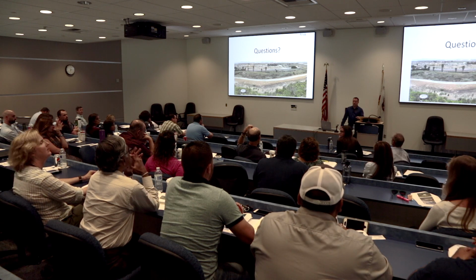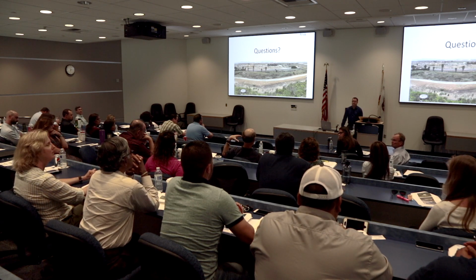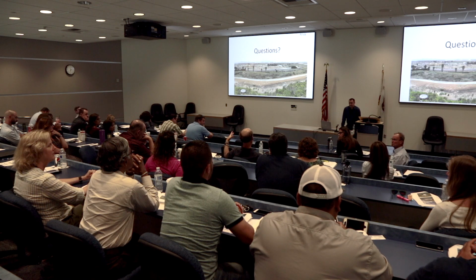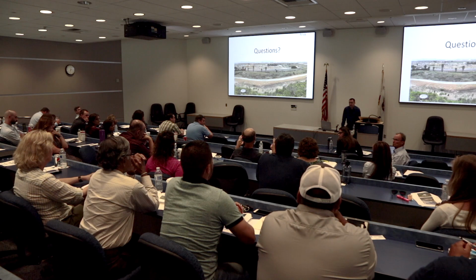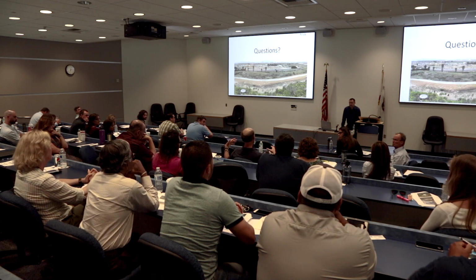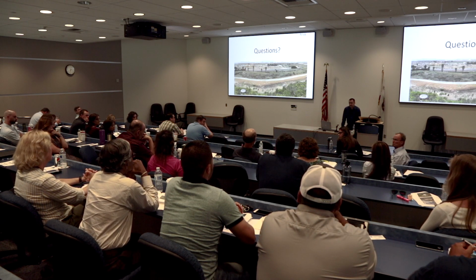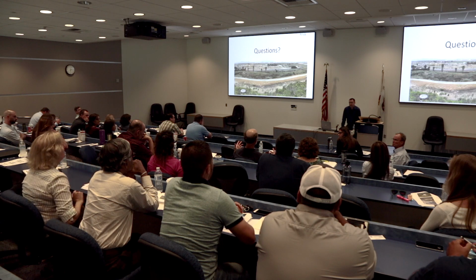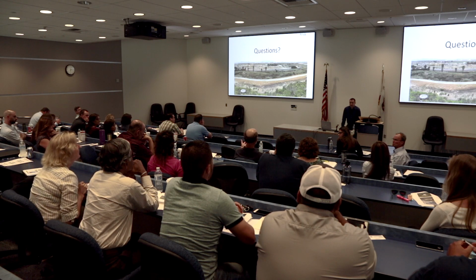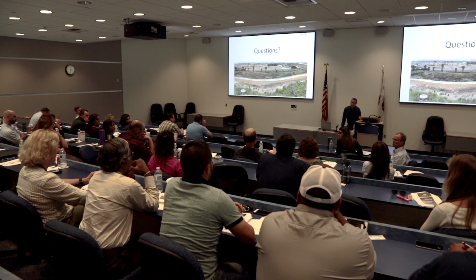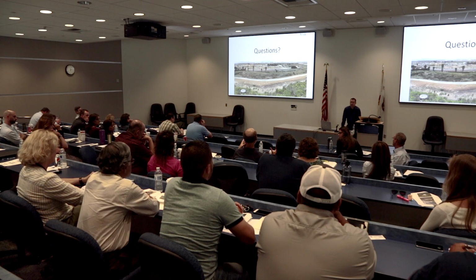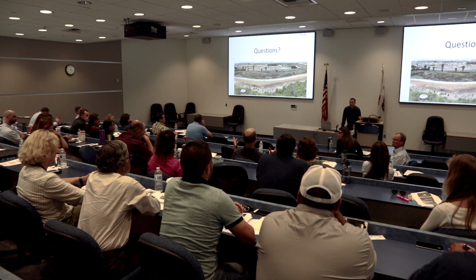Any other? Yes. I think it goes back to the one site where you had the sand infiltration area on the bigger track. It sounded like it was brought online early before they came into the phase of construction. I'm assuming the site was big enough to have a SWPPP, so they would have their own SWPPP that the owners would have to take care of. So even if you brought it online, it seems like the maintenance of it would still be under the guise of the SWPPP. So they'd have the responsibility for maintaining it.